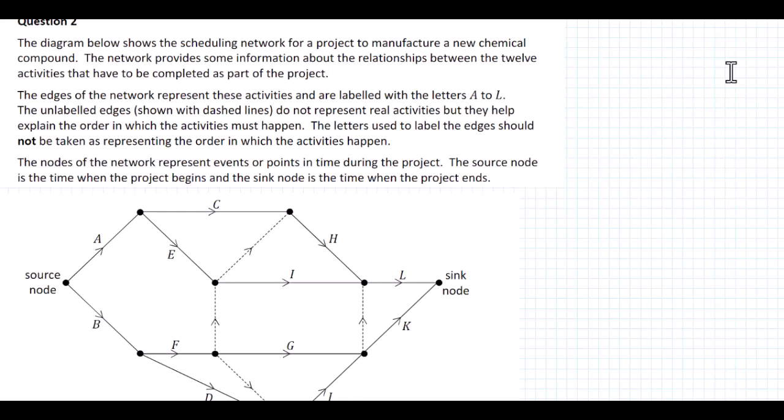The edges of the network represent these activities and are labelled with the letters A to L. The unlabelled edges shown with dashed lines do not represent real activities, but they help explain the order in which the activities must happen. The letters used to label the edges should not be taken as representing the order in which the activities happen. The nodes represent events or points in time during the project, and the source node is when the project begins and the sink node is when the project ends.